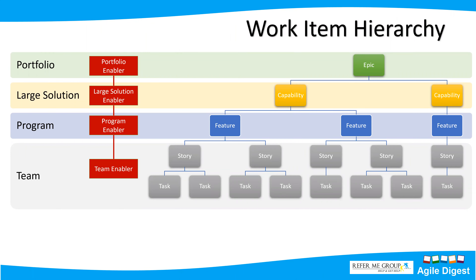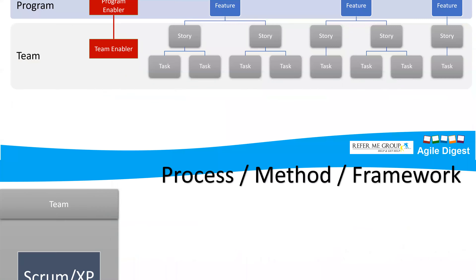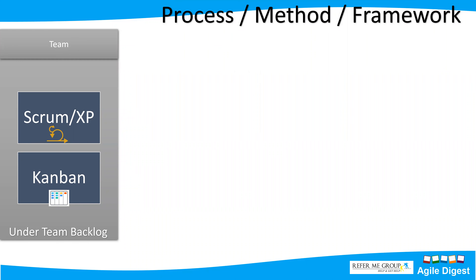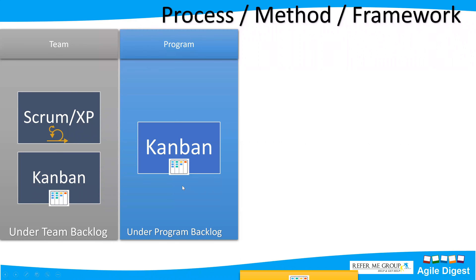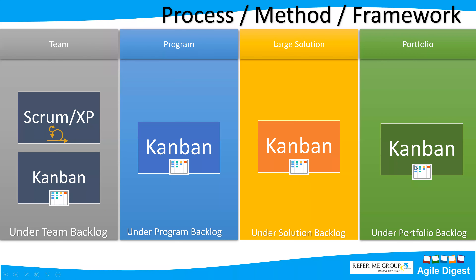In certification classes, which are two-day workshops, we do much more detailed analysis. Now, regarding the process or framework used at each layer: at the team level we primarily use Scrum, XP, or Kanban. At the program level, we use Kanban — we move all features through a Kanban board. At the large solution level, all capabilities flow through Kanban. At the portfolio, portfolio epics flow through the Kanban system.